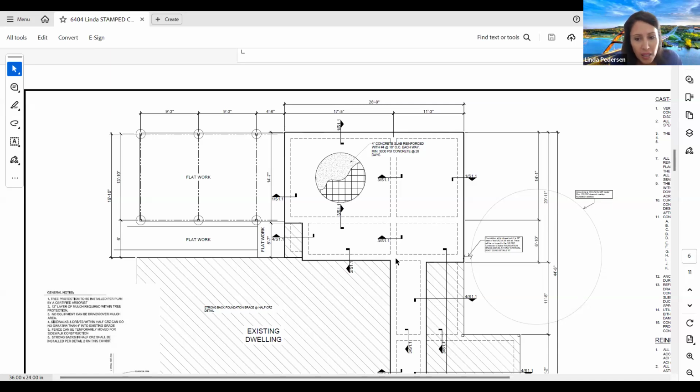So these lines right here, and I think I've got pictures that I can show you, as the foundation was being built, the lines are where the rebar structures are built and poured. The center is like the dirt structure with sand on it, and then they pour over. So you would create the forms, create the rebar, create the dirt and the sand, and then have your electrician and plumber come put anything in, right? Get that inspected, and then you would pour. And we'll show you pictures as we get there.